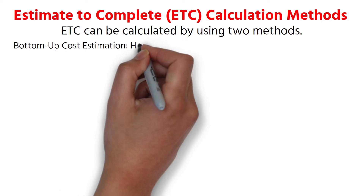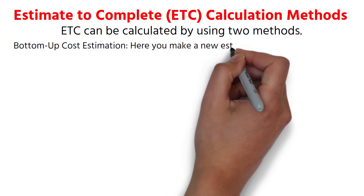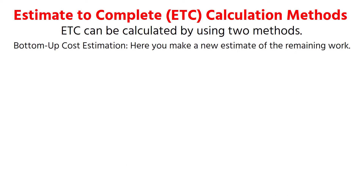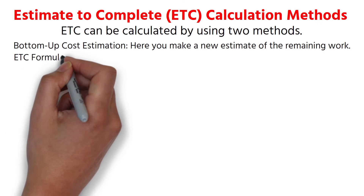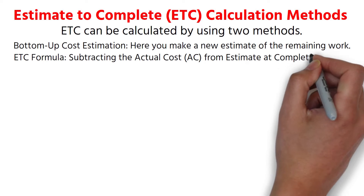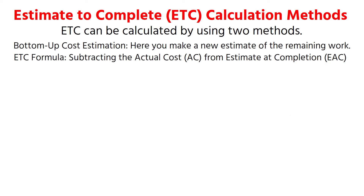The first method is Bottom-up Cost Estimation, where you make a new estimate of the remaining work. The second method uses the ETC formula, which involves subtracting the actual cost from the estimate at completion.